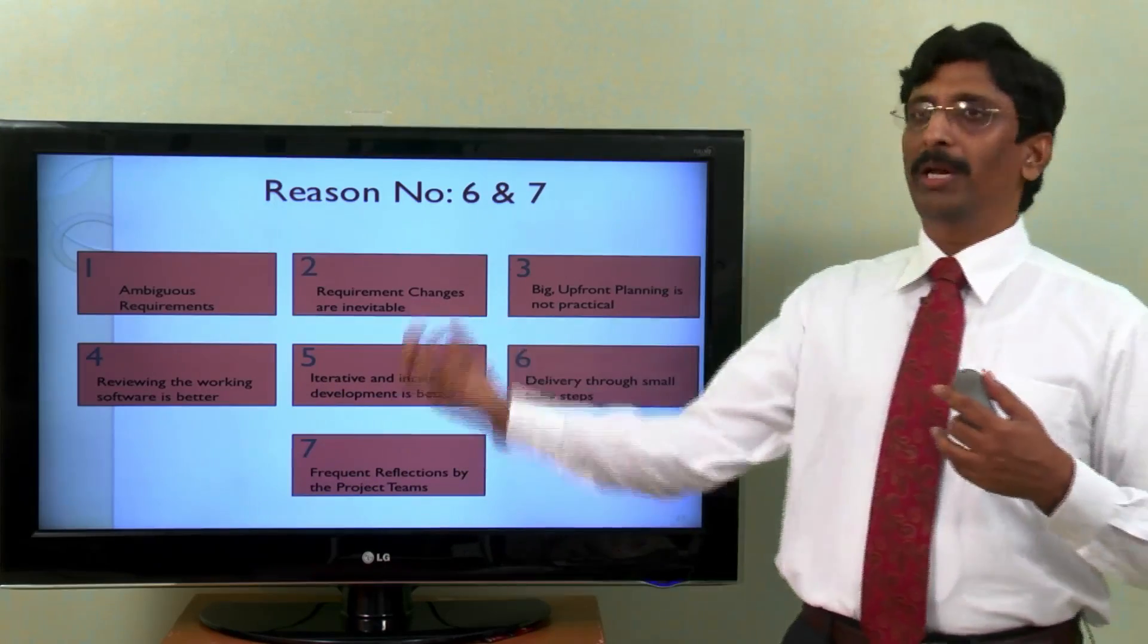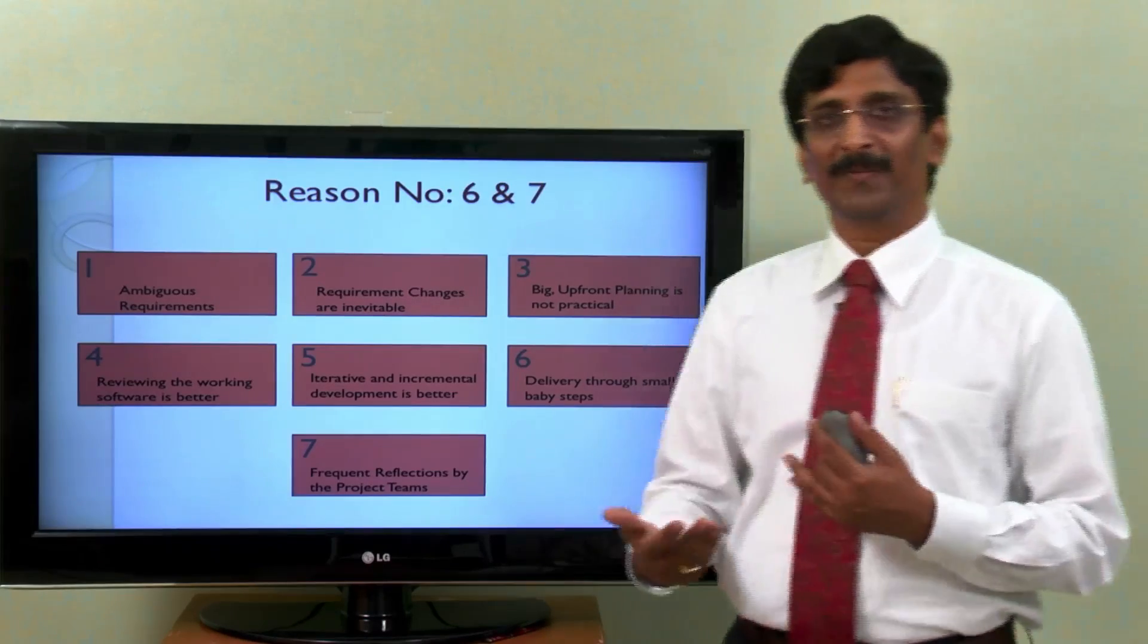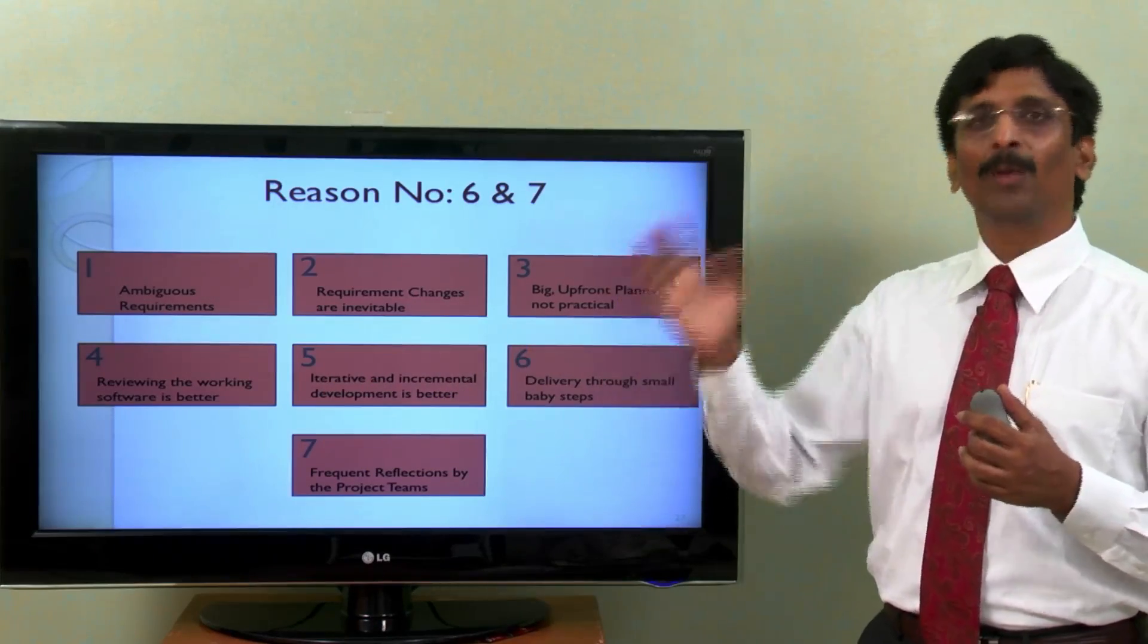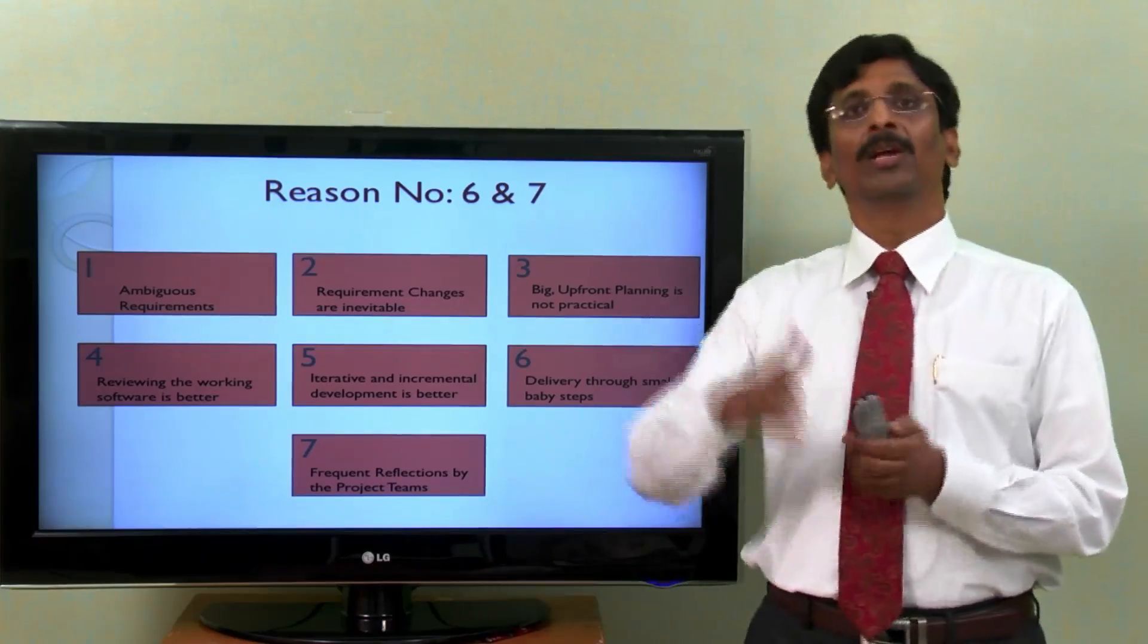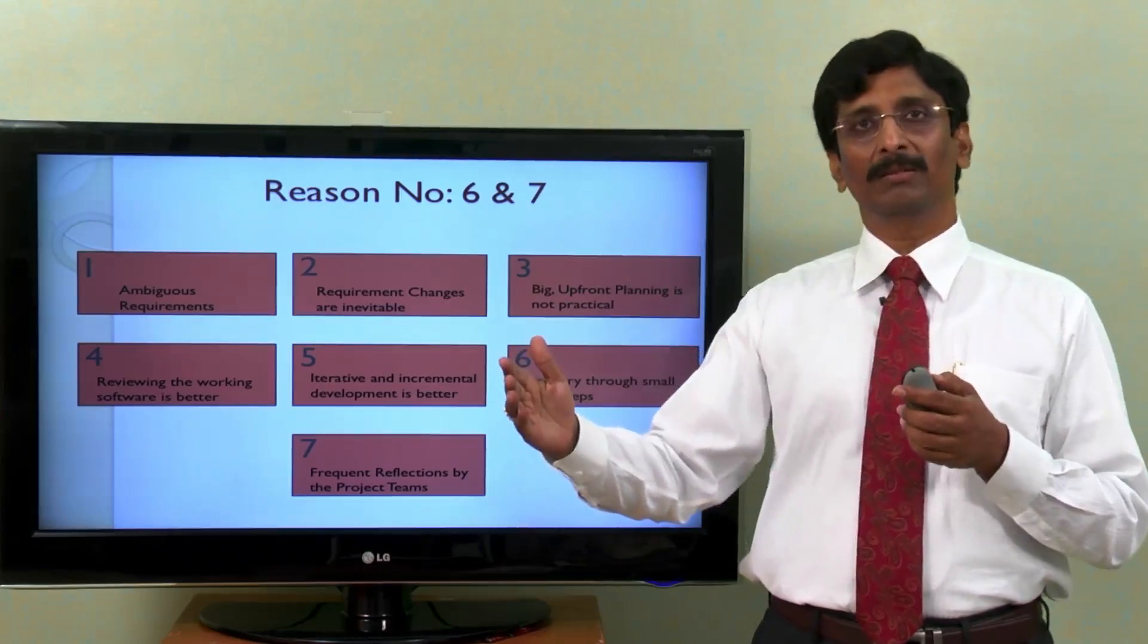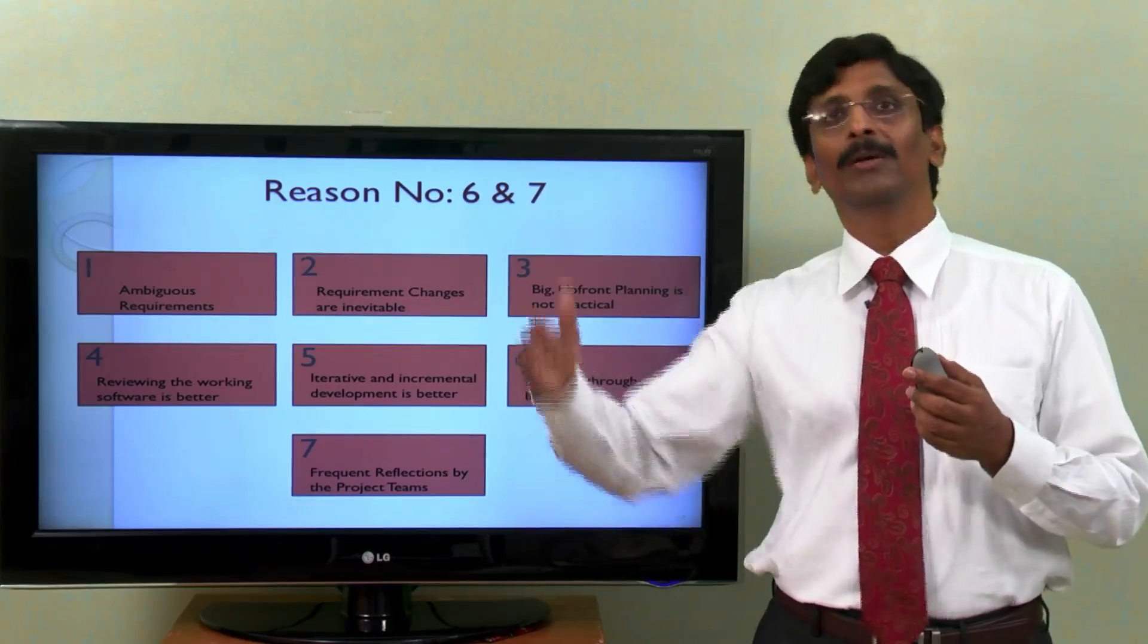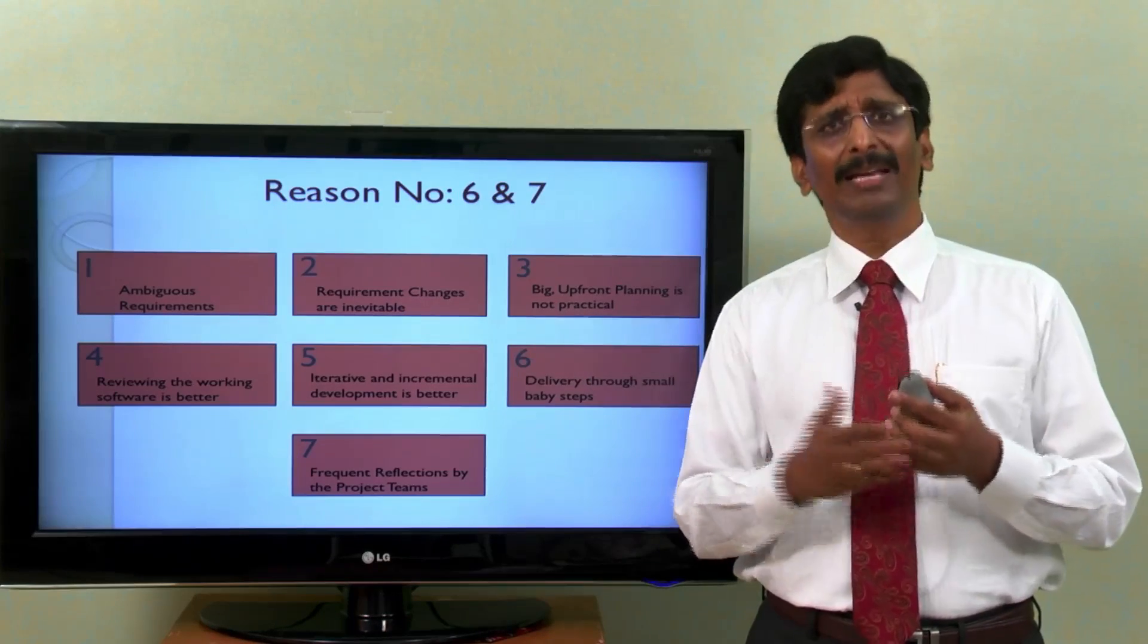Most probably you can use this learning in the next project. But again, next project is going to be new discovery. The requirements or the background may change in the new project. So it may or may not be useful in the new project. Or some projects do a retrospection meeting during every milestone. Say for example, at the end of requirements phase, you may do a retrospection meeting. But again, you will discuss everything about what did you do wrong in the requirements phase by the end of that milestone. Again, where are you going to use it?